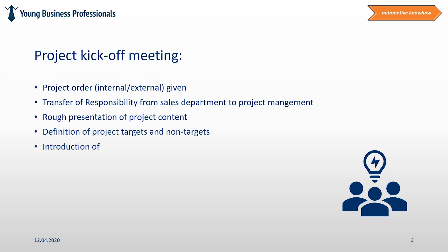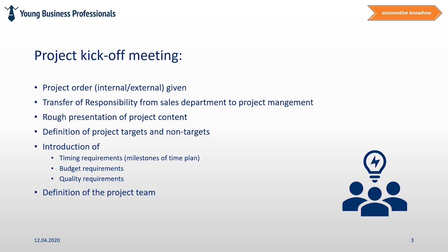During the kickoff meeting, timing requirements, budget requirements, and the most important product and quality requirements will be introduced to the team. In addition, all team members will be defined and the team cross-checks if there are still open points from the previous project phase. These will be listed to make sure that the responsible team member may solve them within the redefined timing targets. Once the meeting is closed, the project team starts to work during the first phase.